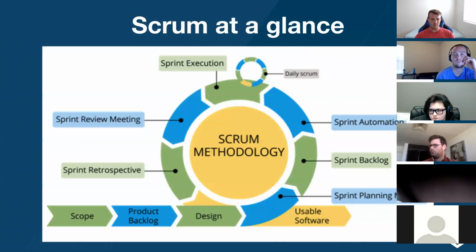That's the time that you bring up and say, well, this could cause a problem with this piece in our software. So you bring up any potential problems that you see. So that's a sprint planning meeting. You hold those before every single sprint. So every 2 weeks, you're going to have a sprint planning meeting to decide what the next sprint is going to look like. So now you've built up your sprint backlog.